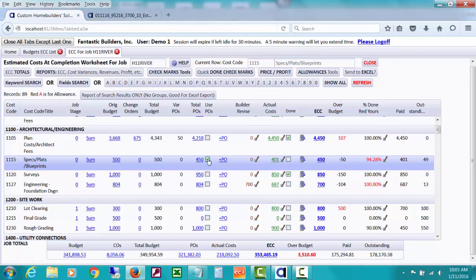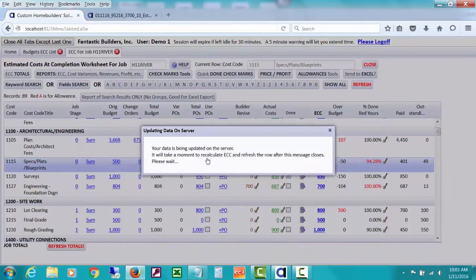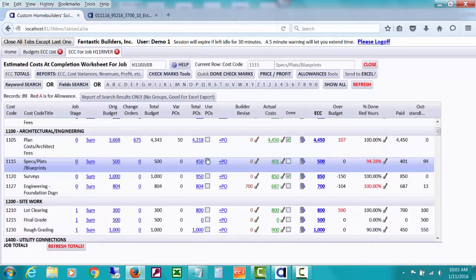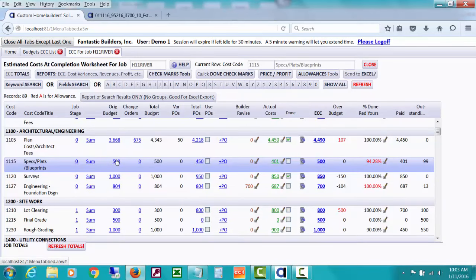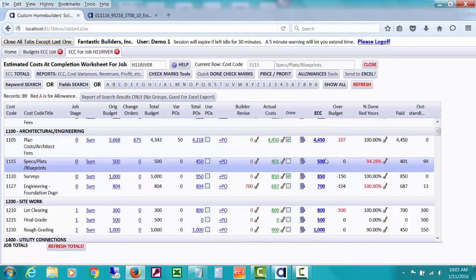Notice that it's refreshing things for us so that it'll recalculate the ECC. We have checkmarked over here, and I want to go back to this column, to use lower POs as the ECC, but watch what happens if I uncheck to use lower POs. It's now going to take the original budget and use that as the ECC unless I tell it to use the lower POs.